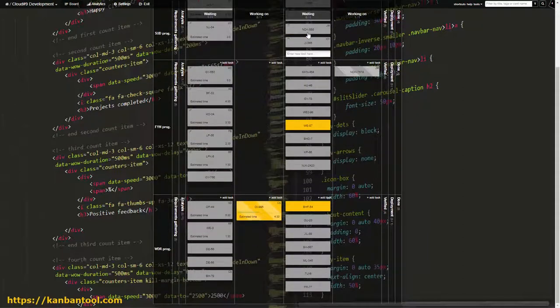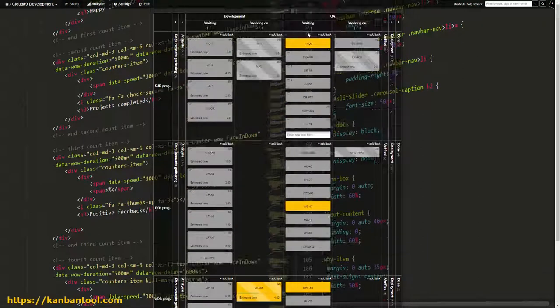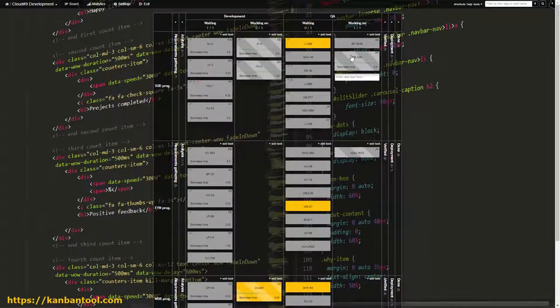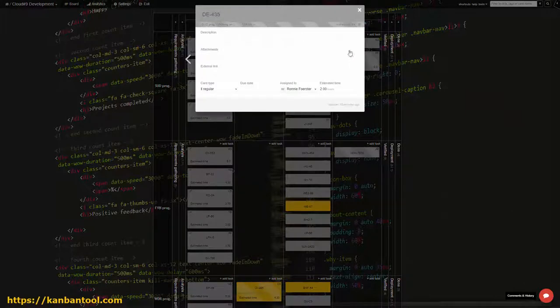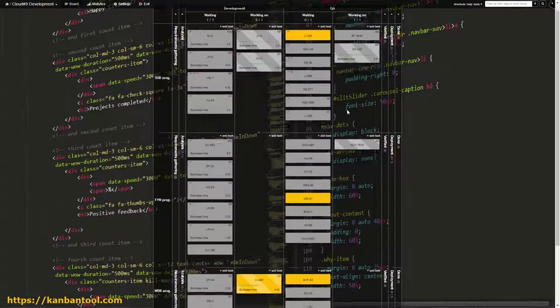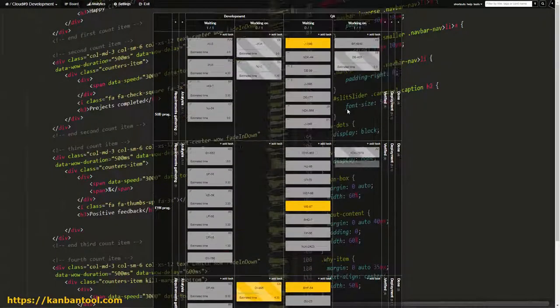Here, however, tasks don't receive team member assignments. Instead, any available tester picks up the topmost card and starts working on it.